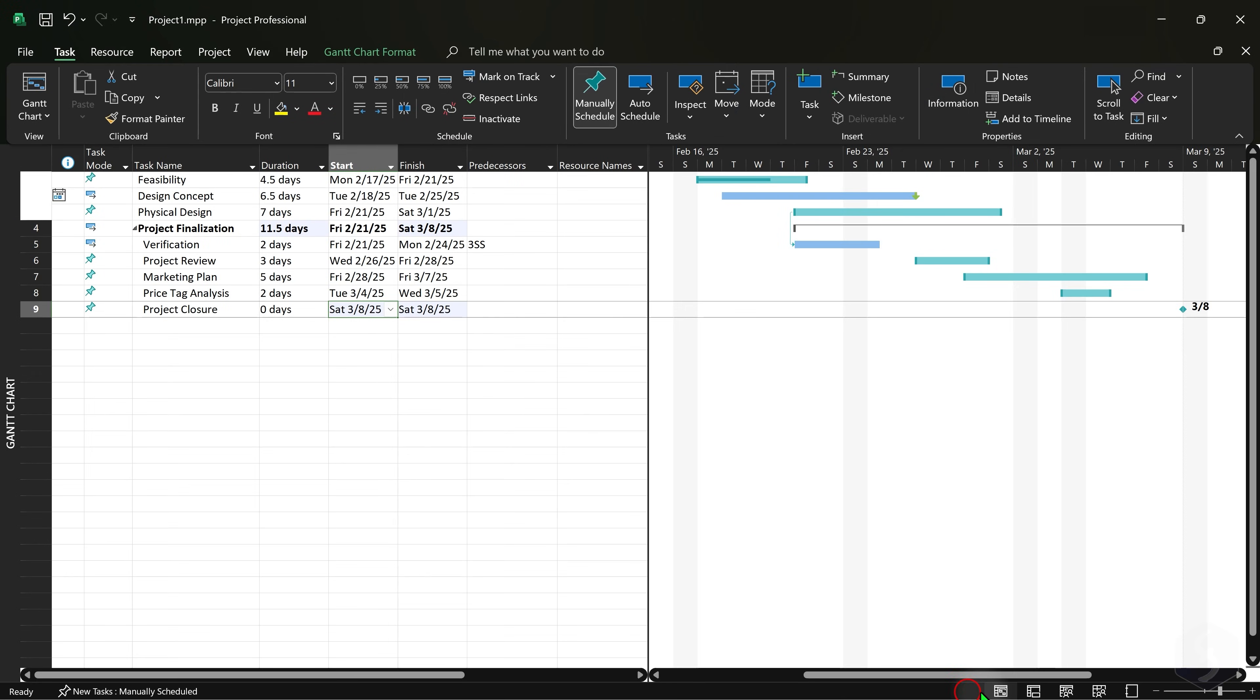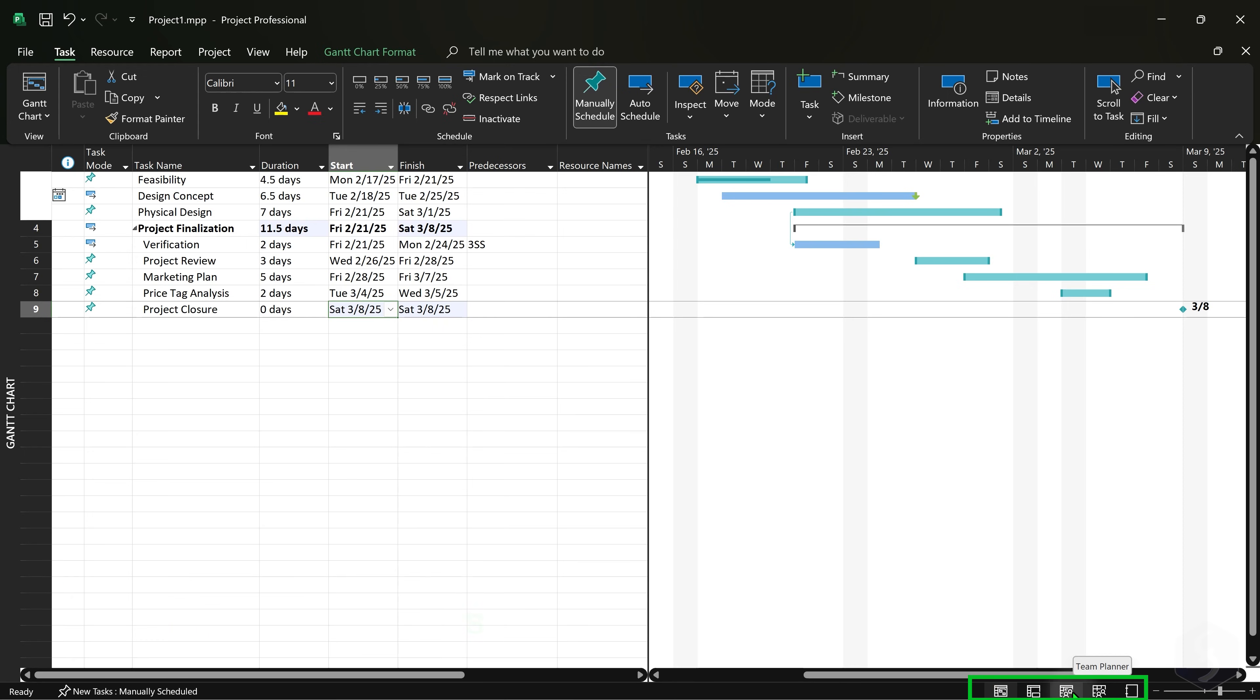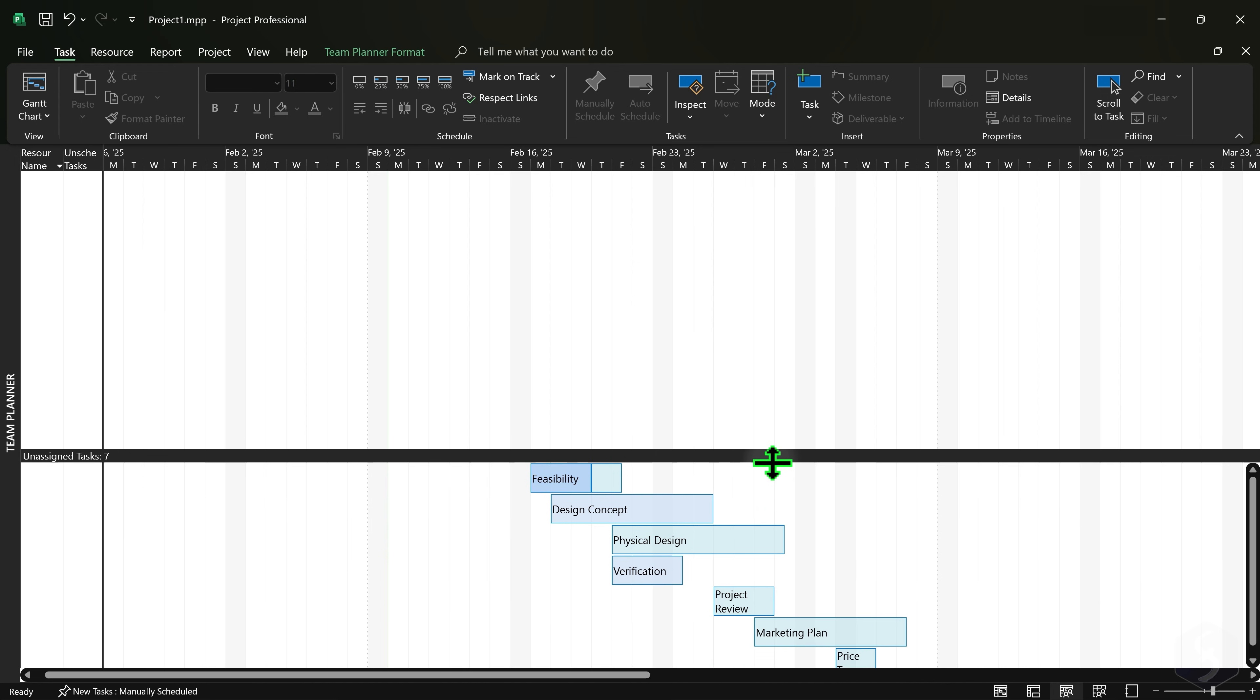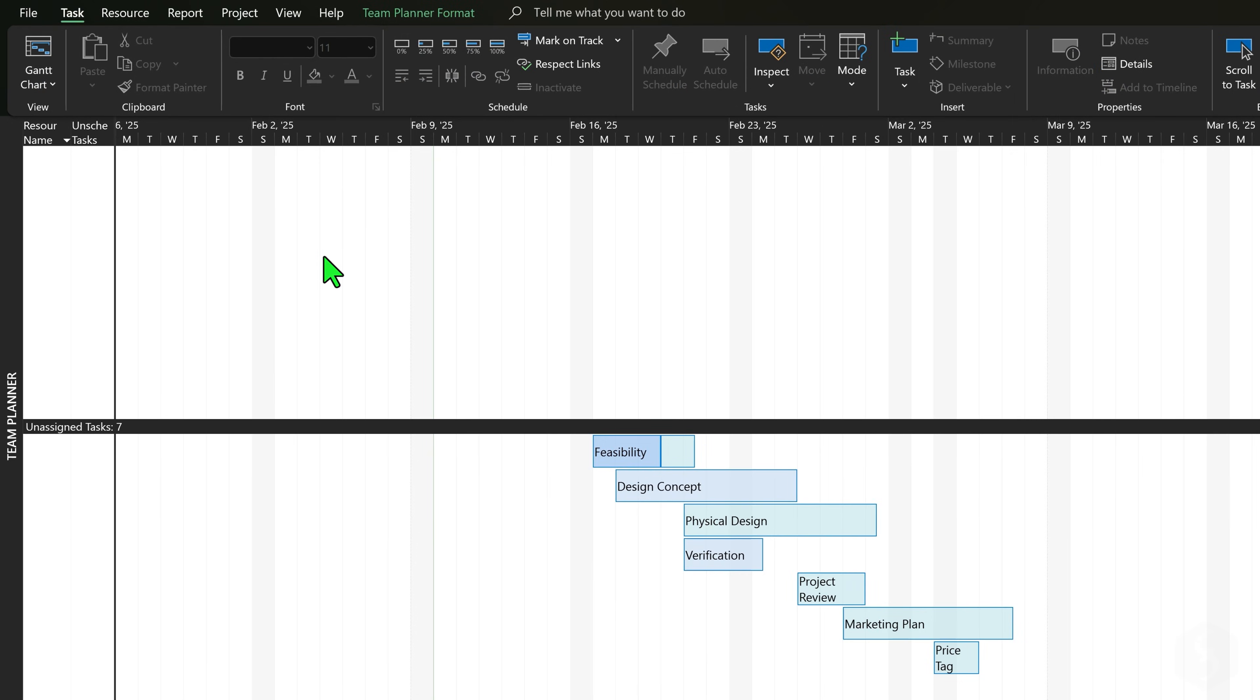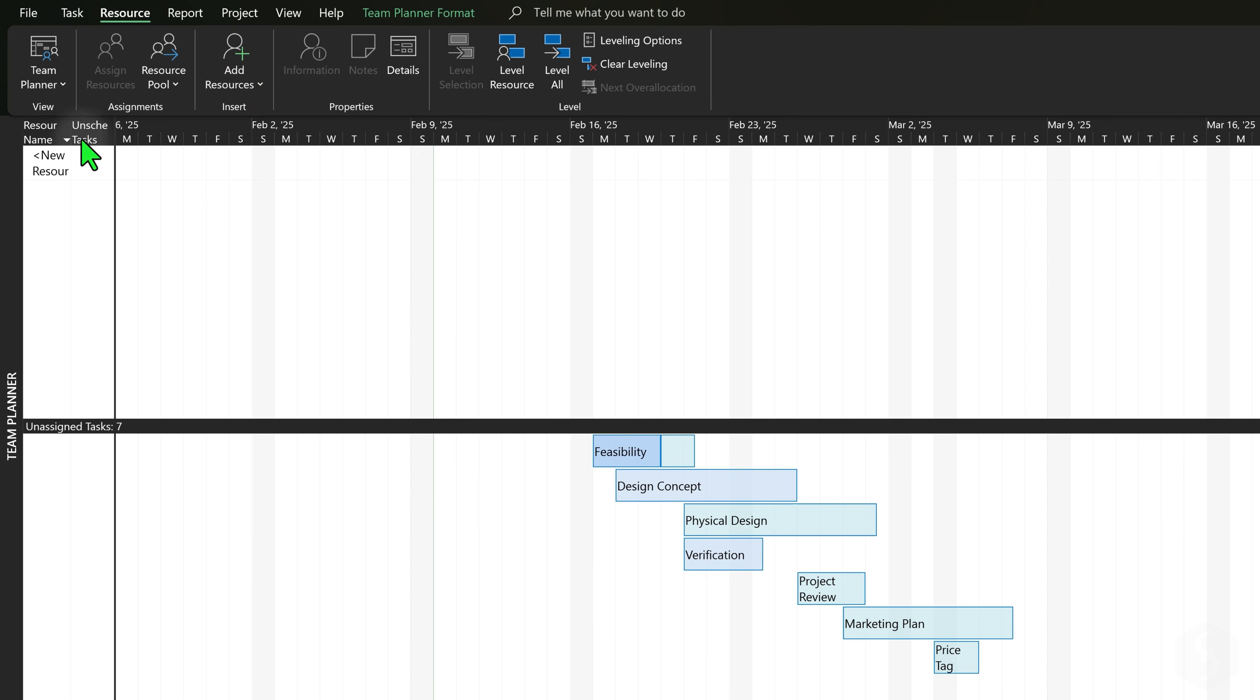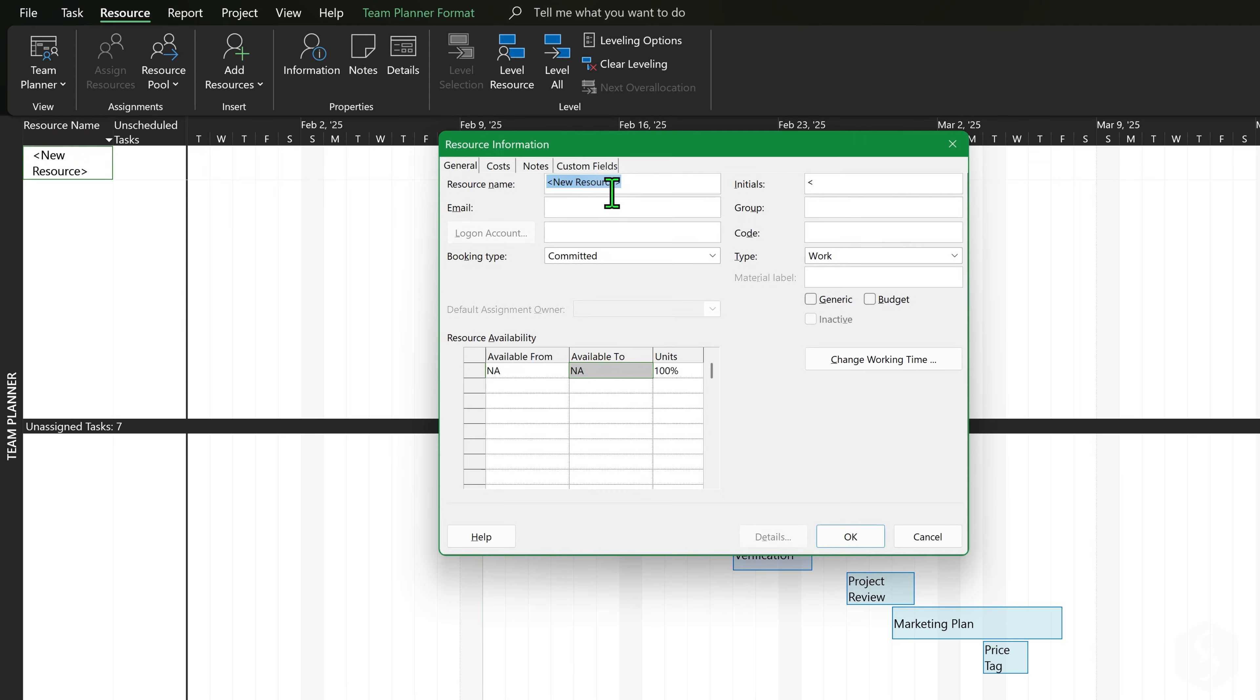Now let's see how to define your resources. In the bottom right corner switch to the Team Planner view and start adding your team colleagues from Resource, Add Resources at the top. Double-click on a resource entry on the left to add name, email address and organization group.